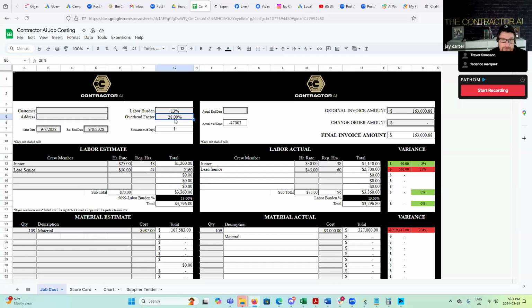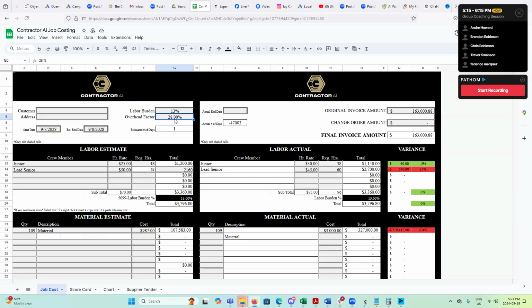Or where should it go, should I say? It goes into your overhead. You've got to absorb that, right? It's coming out of your profit. So if you're doing this properly, you're adjusting and doing an overhead recovery rate every single month. It's a very simple calculation. I'll give you guys all the tools and stuff to do this. Don't get overwhelmed or sweat it. It's very, very simple once you get the concept of it, right?